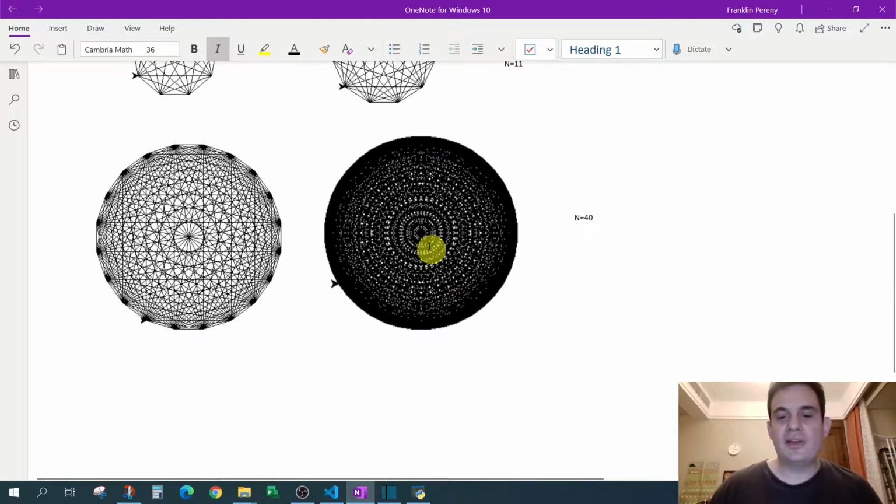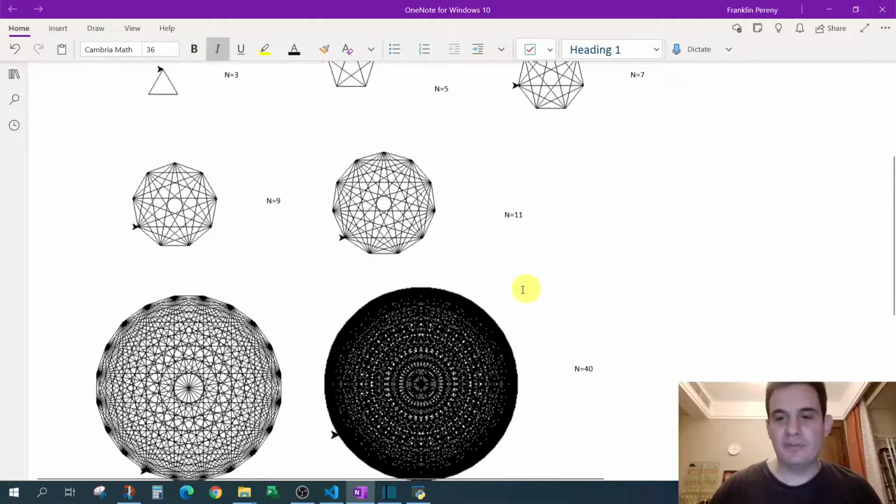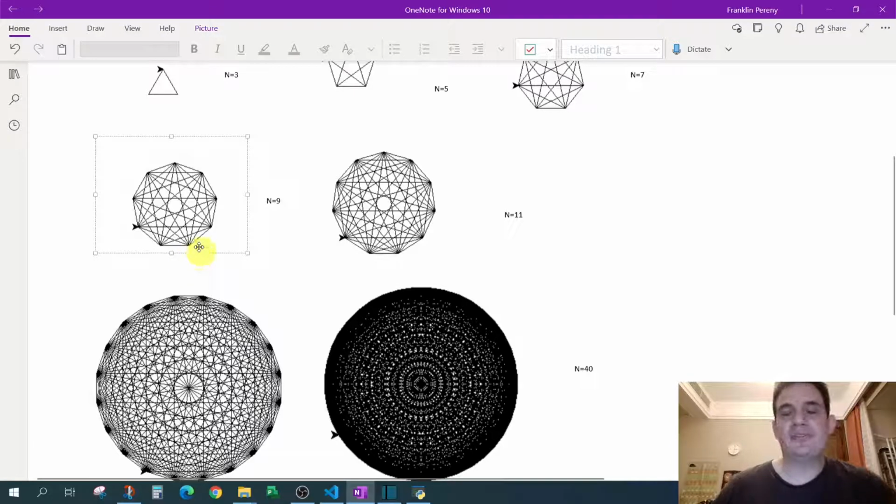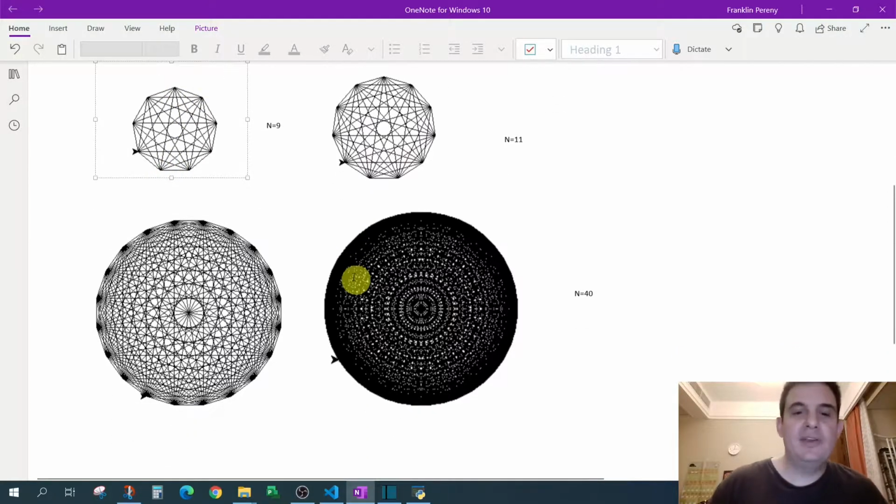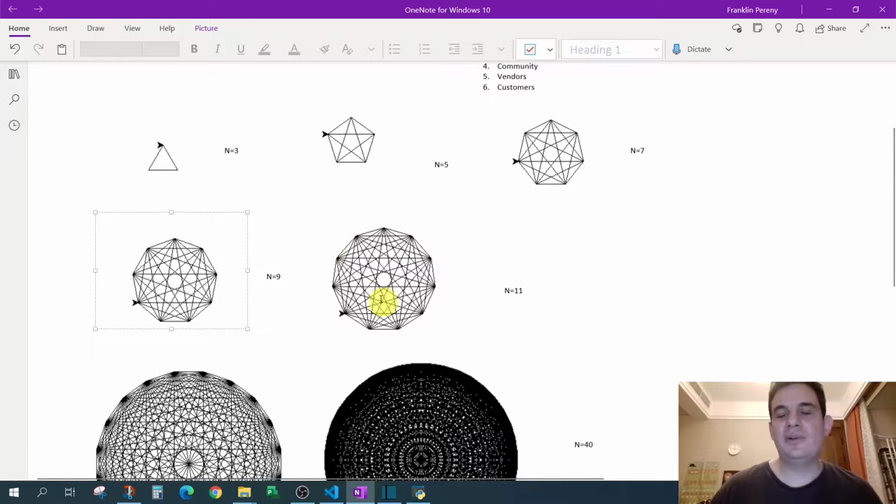So a communications plan is really taking this complicated, crazy amount of communication possibility lines that could still be happening on the side, but setting up a formal communication framework that's maybe n equals 7 or n equals 9. So you might say all formal information for legal goes to this group or this person in this way. All formal engineering changes go to this node. That's what a communications plan is. Communications planning is taking a very complex number of communications that could happen and developing a framework that puts them into a reasonable, manageable number like n equals 9, n equals 7.